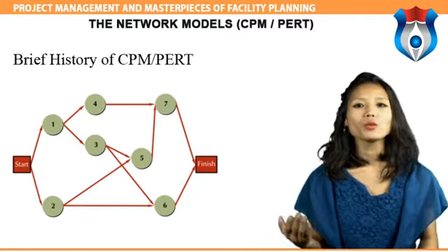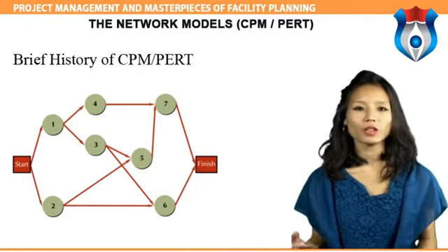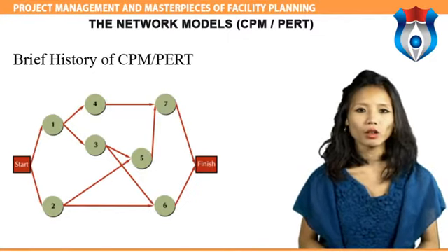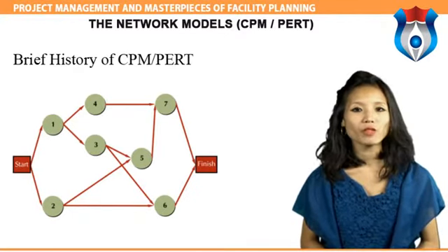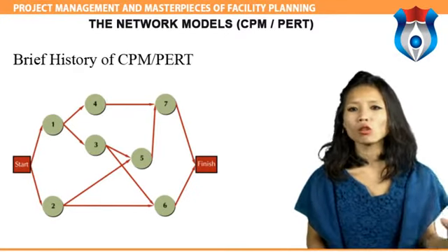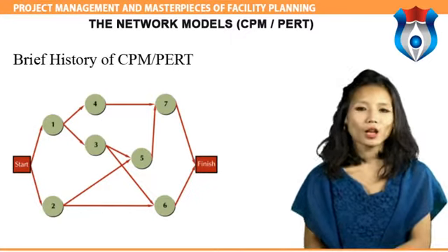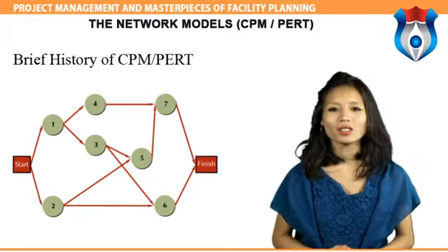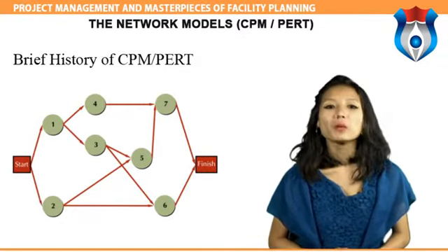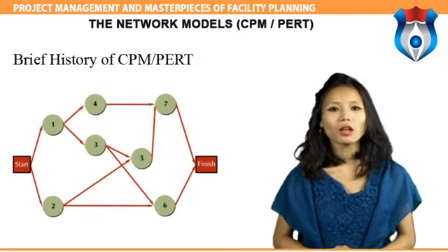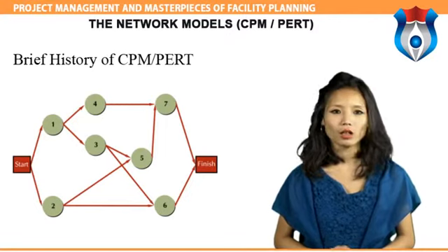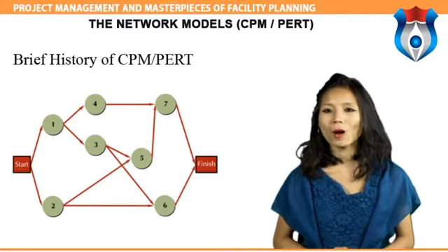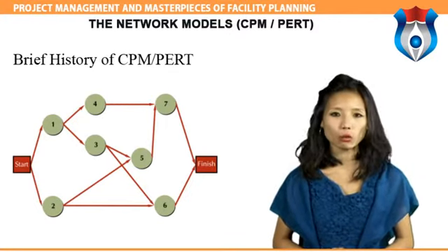The computation was designed for the UNIVAC-1 computer. The first test was made in 1958 when CPM was applied to the construction of a new chemical plant. In March 1959, the method was applied to maintenance shutdown at the DuPont works in Louisville, Kentucky. Unproductive time was reduced from 125 to 93 hours.